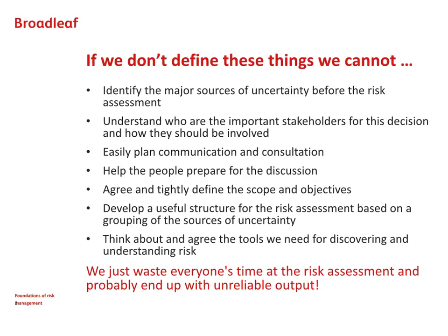Most risk management exercises that go wrong seem to do so because we haven't been clear about our objectives and the scope of the activity. The second reason they go wrong is because we don't have a coherent structure for the activity and we wander around all over the place thinking about risks and evaluating and analysing them without following some systematic process.